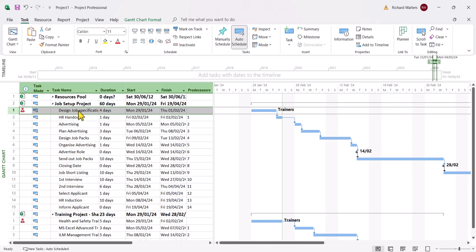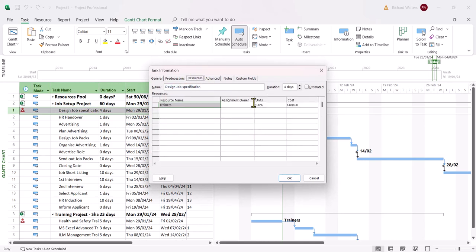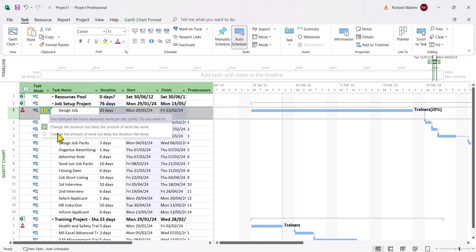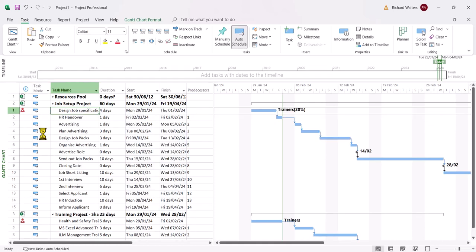I'm going to double-click on ID 1, Design Job Specification, on the first project, go to Resources, and change the percentage to 20%. Click OK. But I'm not going to let the duration change. What's happened is the duration has changed massively because I've taken away 80% of the Trainers' effort, and Project doesn't like that — it wants to increase the duration massively. There's a little diamond here we need to be careful of. I'm going to manage the diamond with the drop-down arrow and say: change the amount of work to 20%, but keep the same duration. And now it changes back to four days, which is where it was originally.